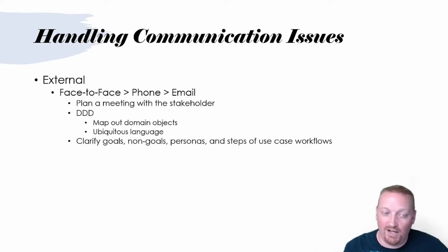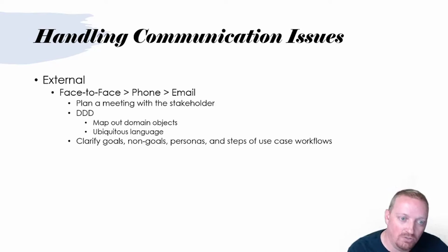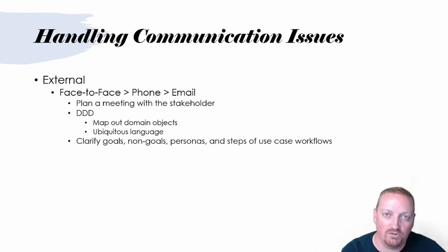One of the other things I really like to talk about is this Inception process, where you define some goals, you define some non-goals, you identify some personas, and then we go through those steps of a use case workflow. If you can get some clarity on those things, that's what you're really trying to get in those meetings: the goals they're trying to accomplish, the non-goals they don't really care about, and who the types of people are that this software or this user story is for.